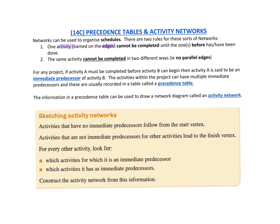An edge might take five minutes, and then any activity connected after it can't be done until it's finished. For example, if you were cooking toast, the butter can't go on the toast until the toast has been cooked — the next activity can't happen until the one before is done. The second rule is that the same activity cannot be completed in two different ways.